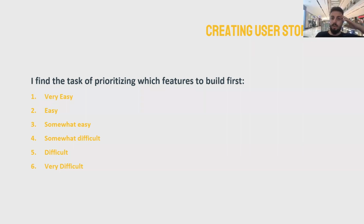Yeah, just a very quick point regarding the tech involvement in deciding the priorities. I think sometimes the features are built on top of each other, and it is important to have certain features before building another more advanced one. Therefore, the say of the tech team is very important. Yes. Because you can't build the very advanced tech feature prior to building the basic one, which basically allows you to deliver on that. So I believe the involvement of the tech team is necessary there. Additionally, the cost which you have mentioned earlier. So I think these are two things which are very important.